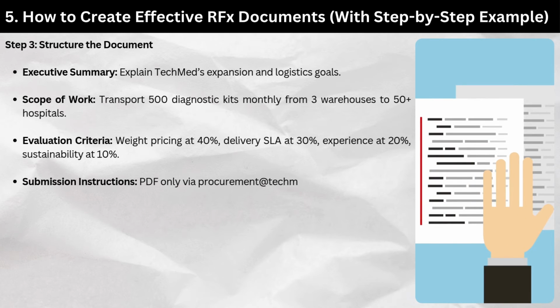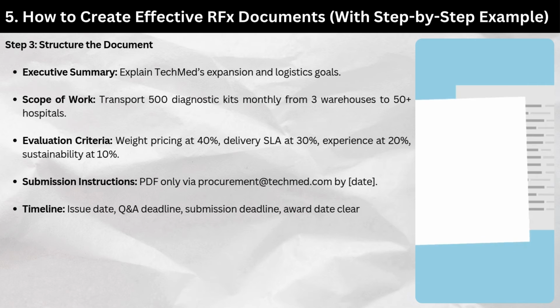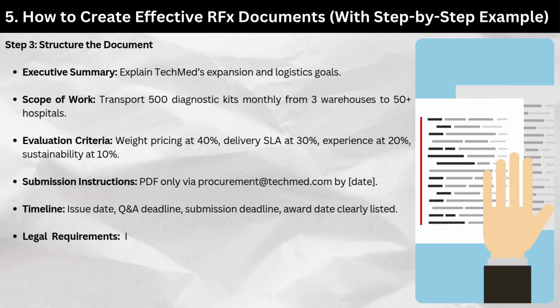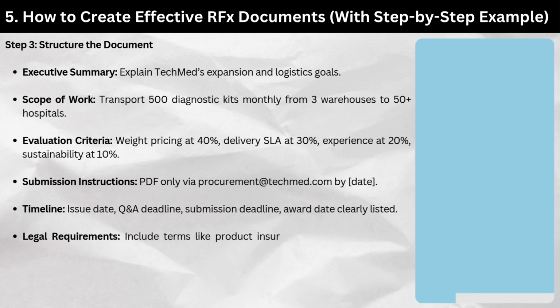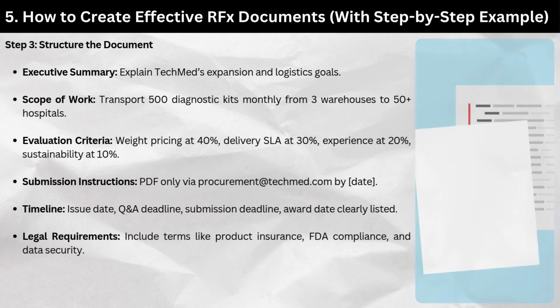Submission instructions: PDF only, via procurement at techmed.com by date. Timeline: issue date, Q&A deadline, submission deadline, and award date clearly listed. Legal requirements include terms like product insurance, FDA compliance, and data security.